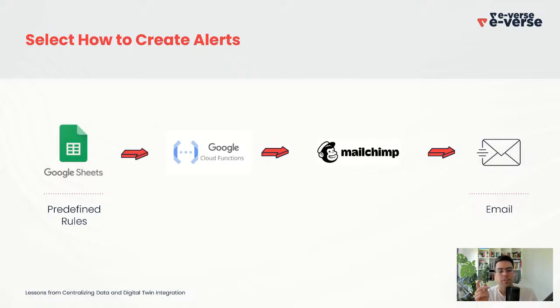And then if something happened, we submitted an alert to MailChimp, which would send an email to everybody that was involved on the project. For example, if the cost or the impact was big, or it was an important RFI, they would get emails. Or if the number of RFIs on a project is too large, they would get emails. There were so many predefined rules. So that was the idea, to allow users to be able to predefine rules.